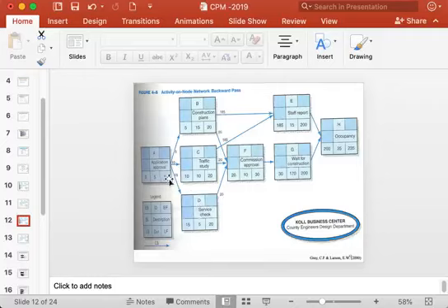If you put 10 here, then activity B can start only after 10 days, and then 10 plus 15 it will become 25 days, so it will be delayed by 5 days, and all these following activities will be delayed by 5 days each. So that is why you have to take the smallest.